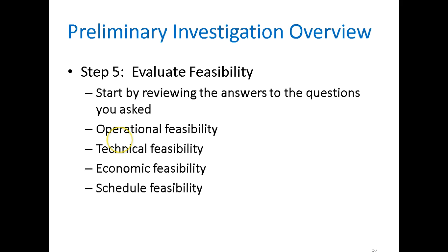You'll estimate the number of hours, say, to set up a server that you've established in the technical side, and then you make an estimate of the pay per person per hour and your basic multiplication.